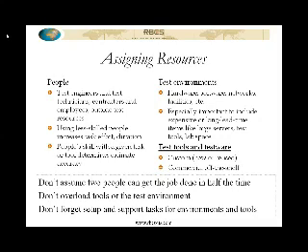Mind is that when you go through the process of estimating the effort and duration, and you ask people how long something's going to take, typically when they tell you, they're saying that's how long it would take them, right? And the more junior people are going to tend to defer to the more experienced people in that process. So there's a risk that you will embed an assumption into your estimate, which is the most qualified person is always the person doing the task.